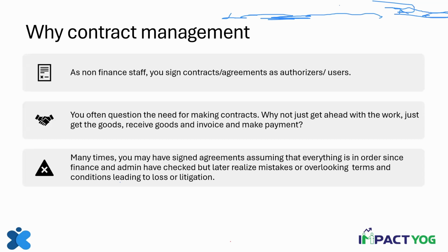Again, contract management begins from the time when the contract has been made and ends at the time when the payment is made. So in the procurement process, contract management starts from the time when the contract has been made, to the time when the product has been supplied, to the time that the user verifies and the payment has been made. That is why contract management is called a management. It is fairly inclusive of many steps. It's not just a contract.